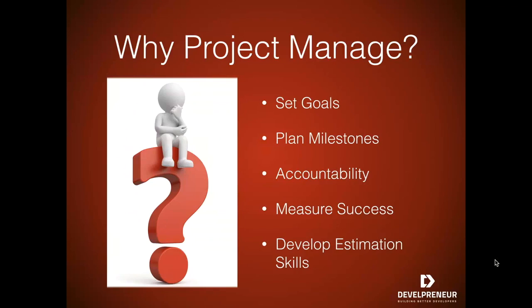And of course, integrated with all of that, it's going to help you develop estimation skills. If you sit down and try to put together a little plan for what you're working on, then you are almost by nature and almost by definition going to estimate the time it takes you to get some of this work done, whether it's hours of development or elapsed time. Like maybe, I don't know how many hours I'm going to work on this week, but I'm going to estimate that I'm going to get this task done at the end of this week. This other task I'm going to have done by next week, I'll hit this milestone by the end of the month, and so on and so forth. So this helps you immensely, and it is very useful for personal projects, but those estimation skills, obviously, we're asked to do that in our daily jobs all the time, so it becomes very important for career development as well.